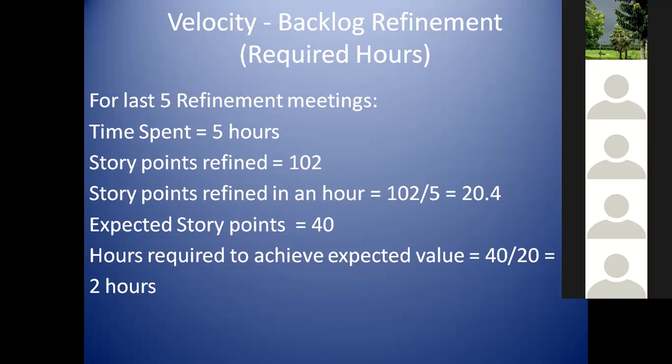The reason is that it will give confidence to your team and your stakeholders that you have a logic behind everything you perform, because it's not just 1 hour regardless of whether it is required or not. If it is not required, you don't plan that week. And if you feel that it is required, and you see that in the second week there are many planned leaves in your team, plan 2 hours in this week itself.